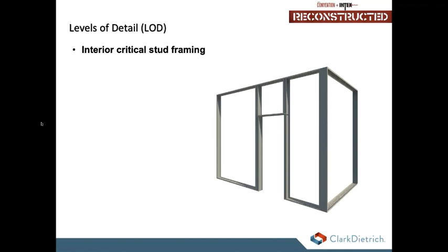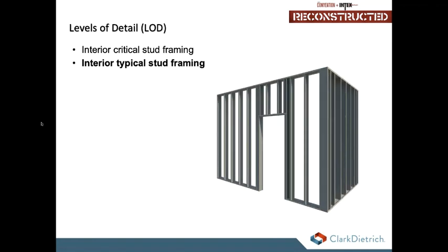We know anything between that can be moved in the field, so we won't spend much time on that. So this is the low quote, I would say, for starting a BIM project with either our team or your team, basically just taking care of the critical systems itself. And then we'll move up into doing the framing between that system, so we can actually see if there's pipe work in that, or if electrical systems are running into our studs, we could do box framing around that. So really offers a lot of help there.